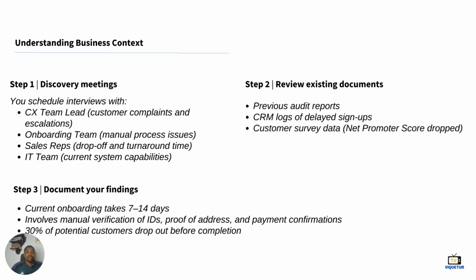the next thing you want to do is to document your findings. So everything you found out from your discovery meetings, from your review of your existing documents, you document it. Oh, I was able to find out that customer onboarding currently takes 7 to 14 days. Okay, good. Whenever they give us their ID cards, we have to manually verify this, check, prove, go to their houses to check whether they actually live where they say, confirm their payment. And this takes a whole lot of time.